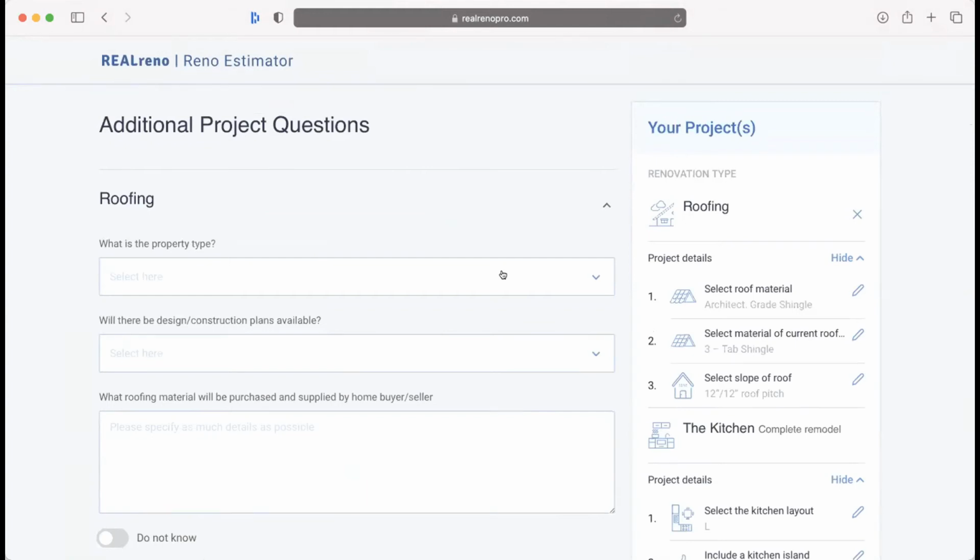And I think the variance in this estimate, part of that variance really is a demonstration of what the margin is for the contractor, right? So if the estimate is between 11 and 15,000, we know materials only cost so much, and labor can certainly vary, right? But the other variable in that span is going to be the profit.